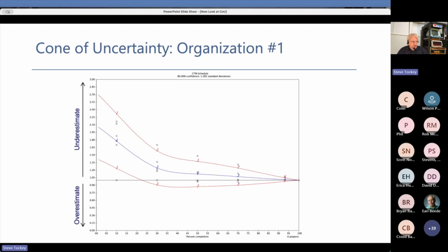that you estimated. And based on what we have seen, the project could actually take as much as 26 weeks. That would be the upper limit here, and could take as few as 12 and a half weeks. That's the kind of variance that we've seen in the past.